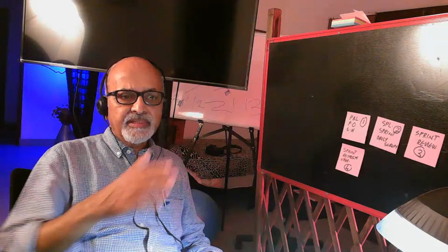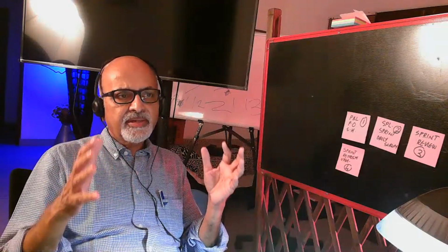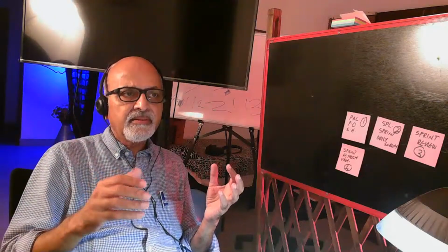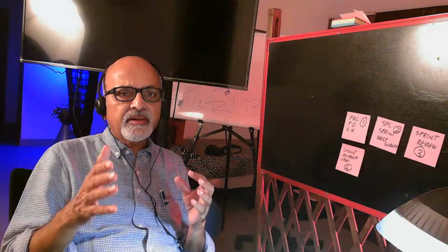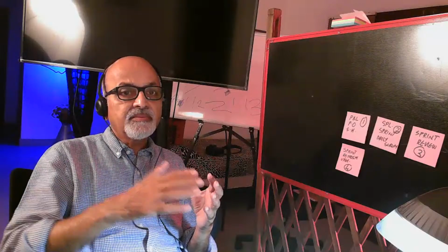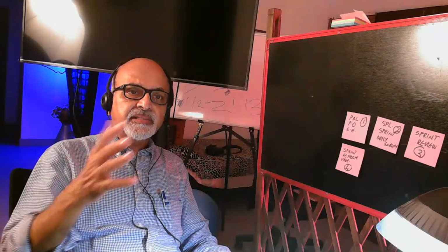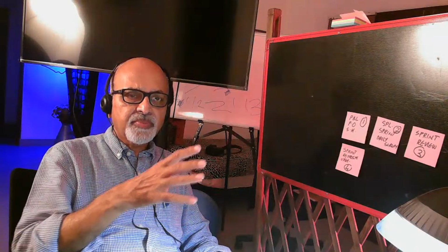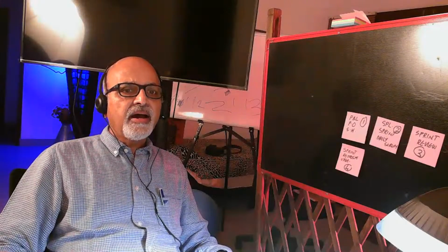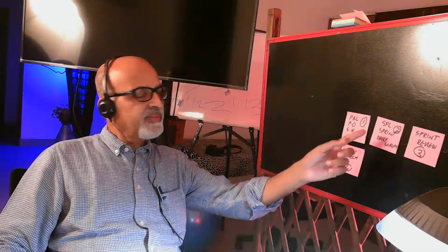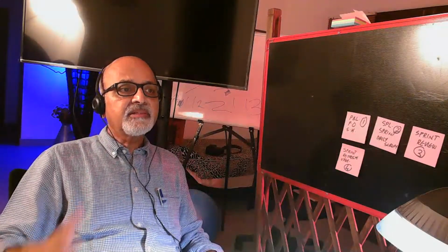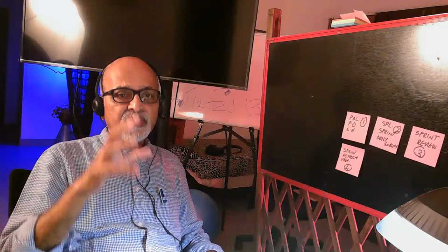Sprint planning meeting is a 7 hour meeting. When I say sprint, it is the iteration or a 30-day cycle. Maximum is 30 days, but it could be 20 days also, it could be 10 days also. But maximum is 30 days. In Scrum, we call it the sprint, whereas in other agile frameworks, we call it the iteration.